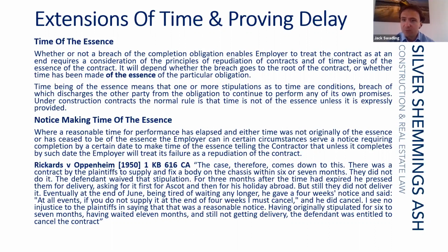However, the employer can take steps to make time of the essence of the contract if after the completion date it serves a notice seeking to make time of the essence. And I've included some notes here of the famous judgment of Denning in Rickards and Oppenheim. I think you can probably look at that in your own time.